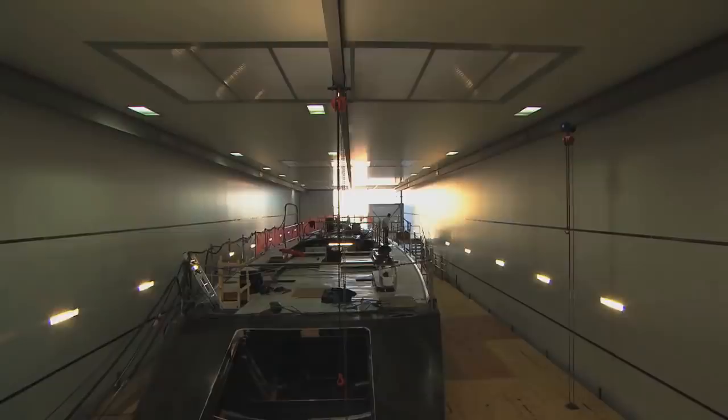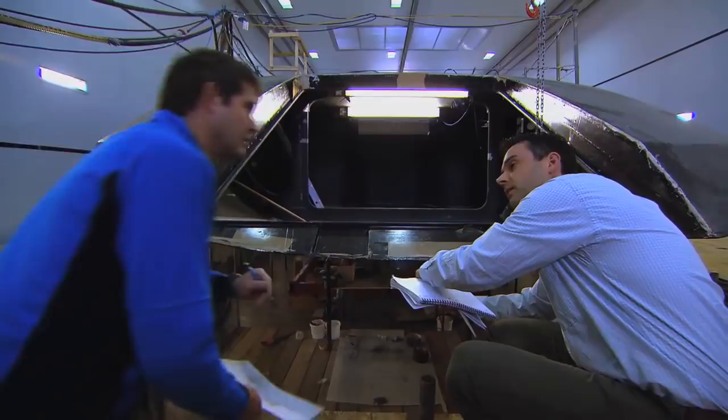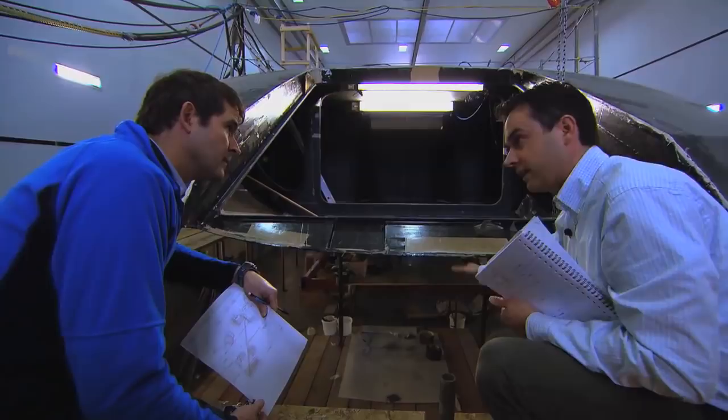At the moment, this is definitely high in relation to the lines. You see, this line will be extended by the fairing process, so that it comes up to here. Yeah. That means this door will be longer as well. And then when the door opens, you might have to risk that it clashes. You need to find out. And therefore I'd like to measure the distance later today.